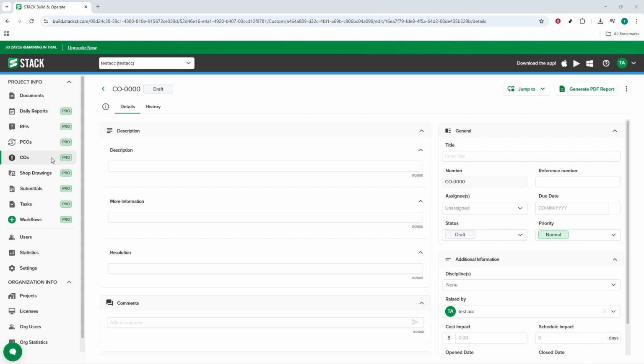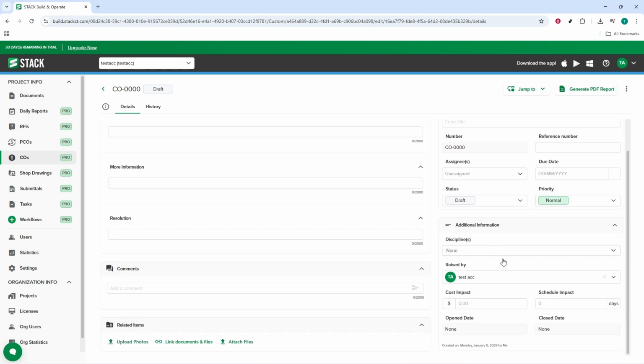Keep your cost codes consistent across the whole project. Cost codes are the thread that connects your budget, field progress, and actual costs. Assign them to estimate items and then use those same codes in your workflows, daily reports, and any issues or change items. When the codes match everywhere, Stack can line up planned versus actuals accurately without manual reconciliation.